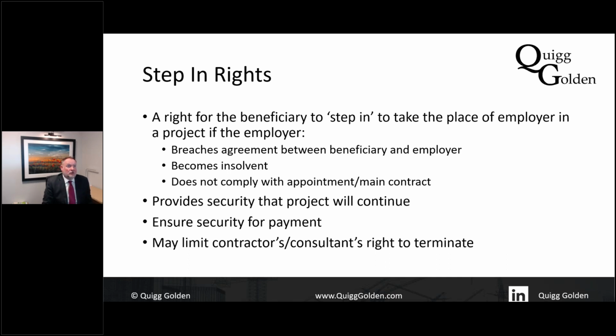And that's a good thing for a subcontractor to see, because it will have an entitlement to get paid in that step-in clause. So yes, if the main contractor goes bust, you may have to continue working, this time directly to the employer, but the employer has to pay you for it, which might put you in a much better position than you would have been had the employer not stepped into the shoes.